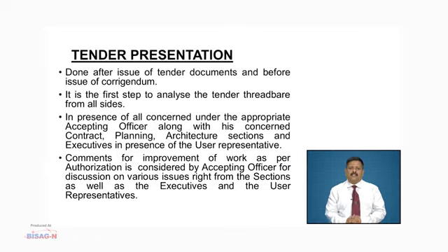Today I am here to discuss the importance of tender presentation. Tender presentation is a critical stage of tender formulation and tender procedures. It is usually done after the issue of tender documents and before the issue of corrigendum. The corrigendum is issued after the tender presentation, if any. It is the first step to analyze the tender threadbare from all angles.